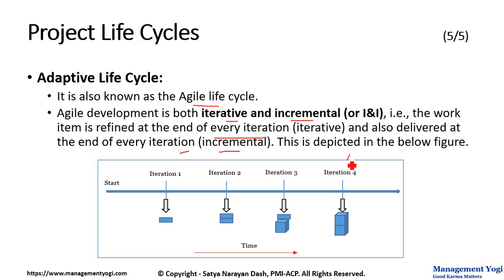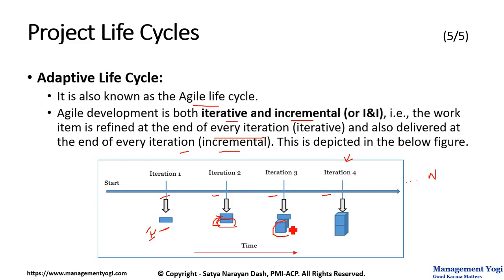This is depicted in the figure below. A project is divided into multiple iterations: Iteration 1, Iteration 2, Iteration 3, up to Iteration N. In the first iteration, you deliver one item or an increment. In the second iteration, you have another delivery on top of this increment — an additional one added on top. In the third iteration, you are again refining the product further and also giving another increment on top. Similarly, Iterations 4, 5, through N. So you are refining in every iteration and also delivering incrementally at the end of every iteration — that is why it is iterative as well as incremental, and the name is Adaptive or Agile Life Cycle.